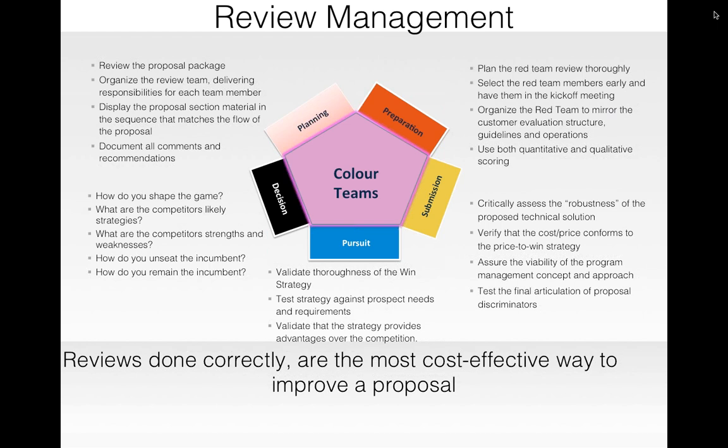So you have the blue team, which does the pursuit review, and their responsibility is different from the decision making team, the review team which does the black hat review, or the team which does the red team reviews. At the pursuit level, what you are validating is your winnability and your strategy to win.